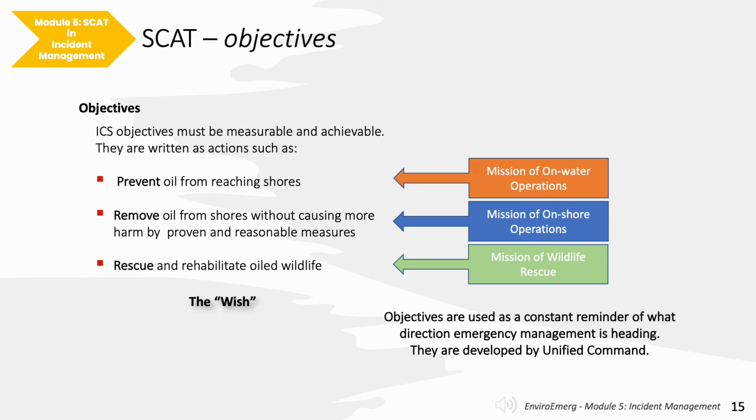Remove oil from shores without causing more harm by proven and reasonable measures. This is the mission of onshore operations working with SCAT. Rescue and rehabilitate oiled wildlife. This is the mission of wildlife rescue. These objectives are spoken to at all unified command and planning meetings. They are written into the daily incident action plans. This is why the incident command system is referred to as management by objectives. They keep everybody on track.